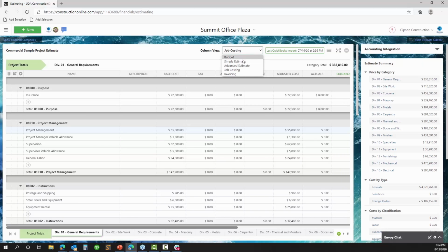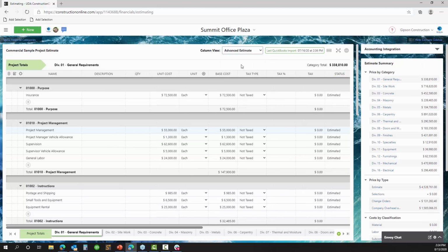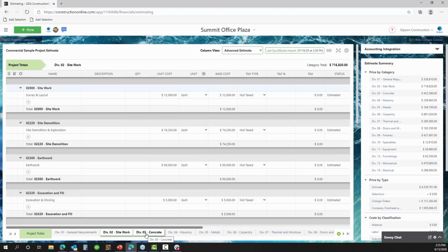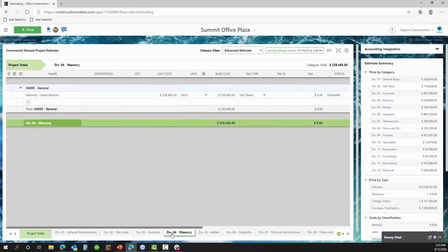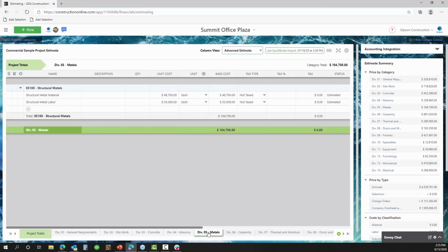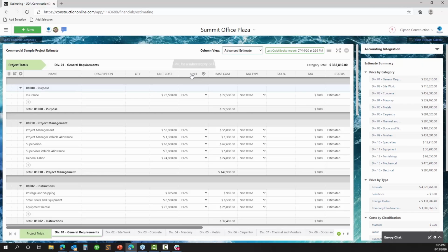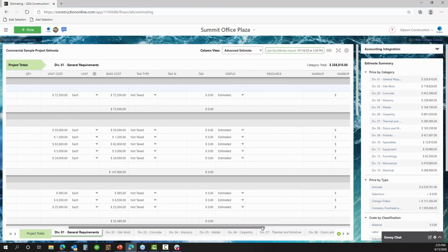Now, it's a little outside the scope of what we're covering today in terms of how to actually pull the actual cost back in, but do know that the estimate itself really is a large data set, or a large database, that's going to contain costs, prices, and the status, if you would like to track whether or not you've got bids in or whether you've locked in a firm price from a subcontractor. We're going to be tracking things like the unit of measure throughout, which looks really great on different reports that you would run. Any tax obligations or extra costs due to sales tax that you might have to pay, depending on your location or not.